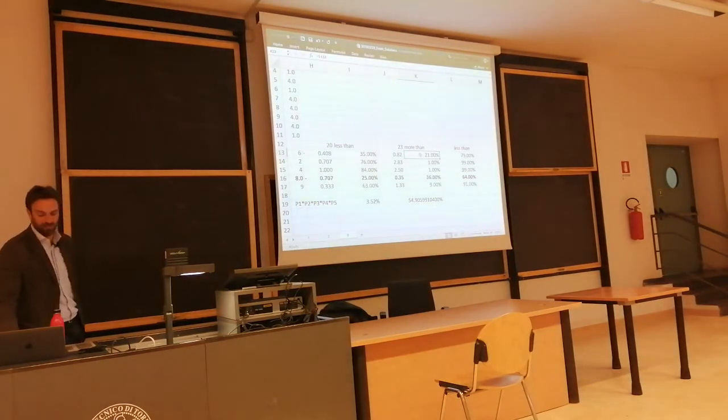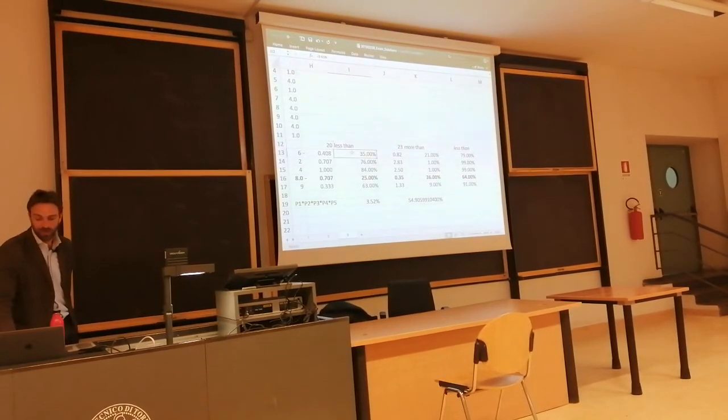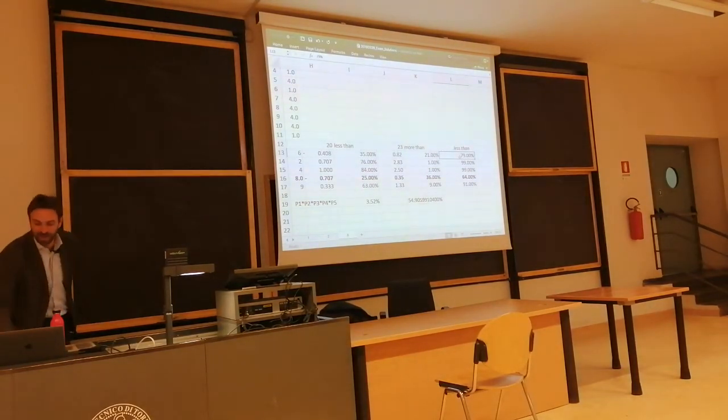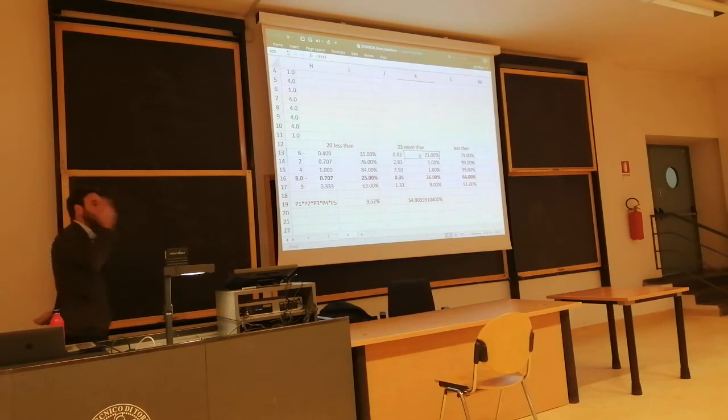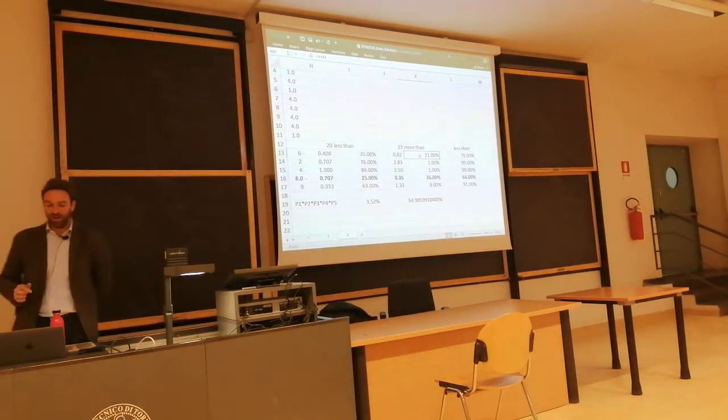So now we have, on path number 1, 35% chances to finish before 20, and 79% to finish before 23, with remaining 21% chances to finish after 23. Make sense? I did that for all paths.